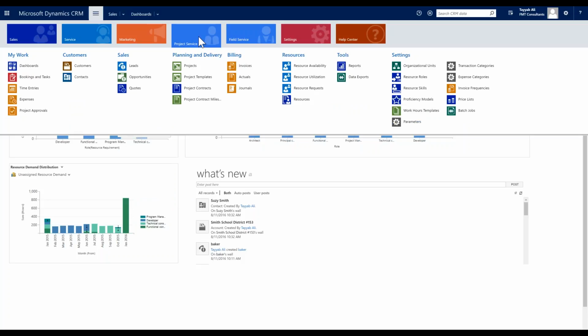Now, time when these tasks are completed are also approved. So a project manager is able to control billing in a way that is not available through other types of systems without a laborious process. In this, we're able to have the task be assigned as being completed, and then it's delivered to the project manager, who can then verify that the code is working or that it has been tested, that the documentation is adequate, and then allow for that time to be approved, which then applies towards the contract invoicing.